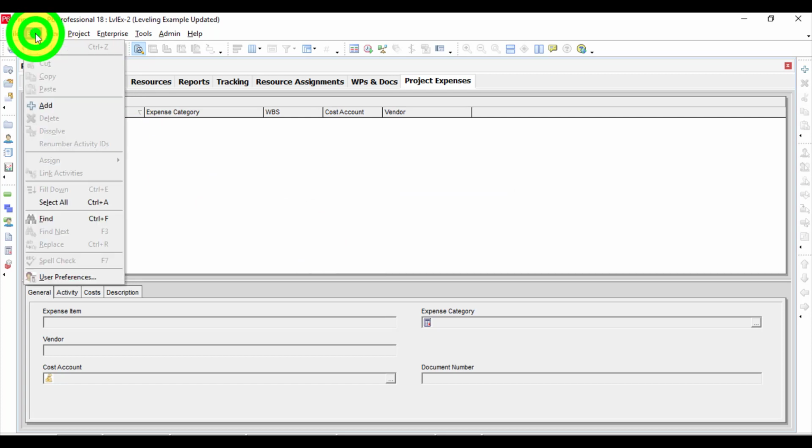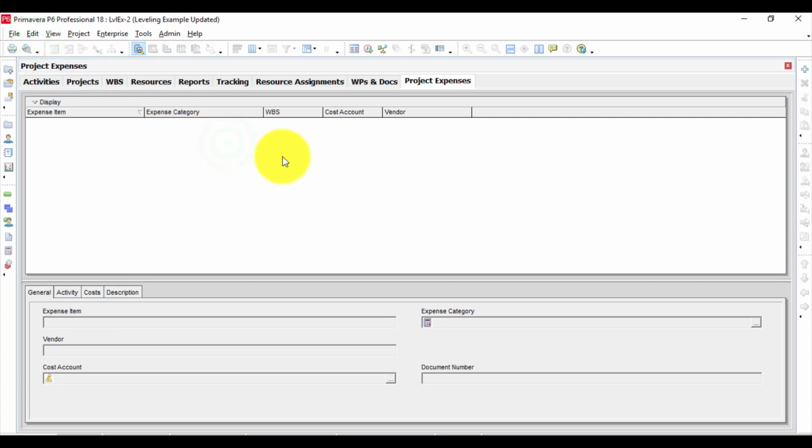Yes, you go edit, it disappears. Now, if you are deleting an expense which is already in a project, it's a big disaster because you need to return it back to the same activity which it was assigned to, which you might not know. So it's very critical in this, and I consider this as orange, but with the privilege issue, you need to be careful about it.